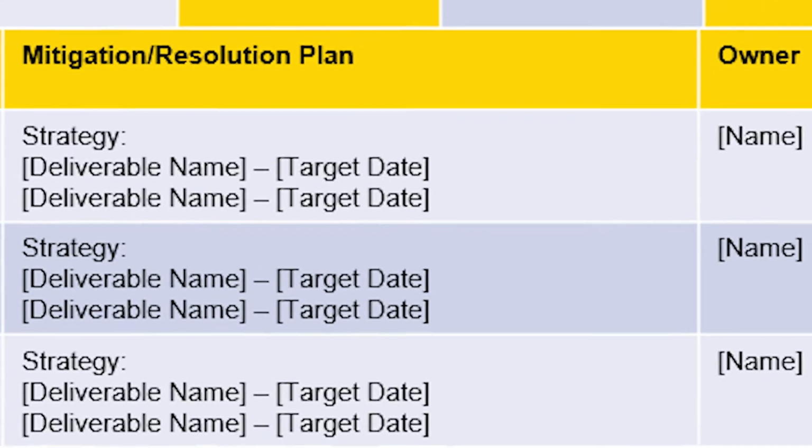Your issue resolution plan should be interpreted as being a return to green plan, so use that to show the actions and deliverables you need to return to a green state. Name the action owners and the target dates. It's so vital in this situation that you give the appearance of being proactive, of being fully engaged with solving the problem, even if additional help is needed. You can't afford to look like a passenger in your own project.